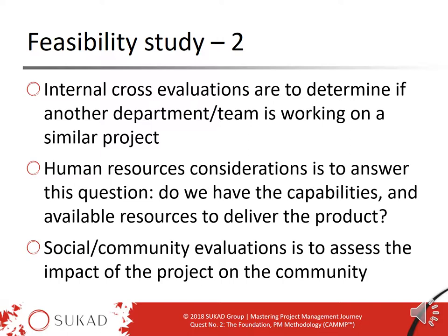In some situations, especially with NGOs or government organizations, projects may be launched because of a community or social need. Even then, a feasibility study is still necessary to determine what the need really is. For example, our first book, 'The Inheritance,' was a story about building a community center. Even though it was a non-profit project, we still had to evaluate whether the community actually needed such a center, and if so, what kind of services they wanted, in order to assess our ability to deliver it successfully.